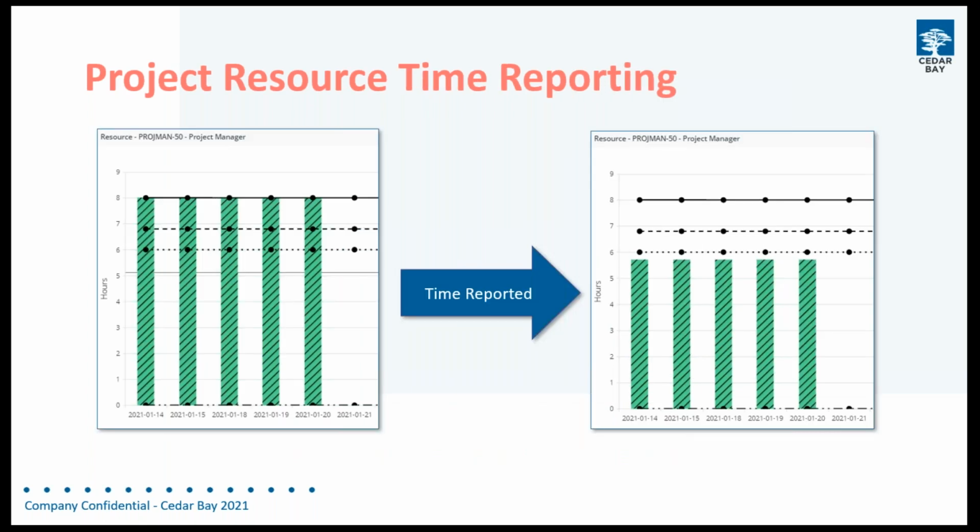Okay, so as we go through our projects and we've allocated resource to the projects, the next thing that we'll see is that people will be booking their time, an individual reporting time to a project, to a specific activity. And we want to be able to take that into account when we're looking at capacity, because if we've planned 200 hours for an activity, but we've already reported 190 of them, then obviously there's only 10 hours left.